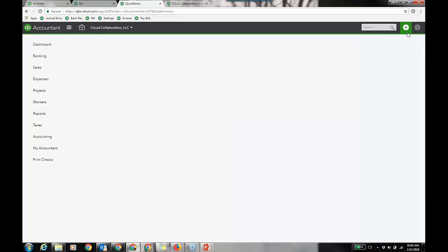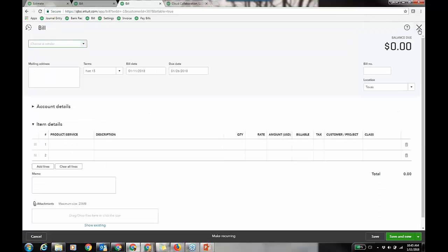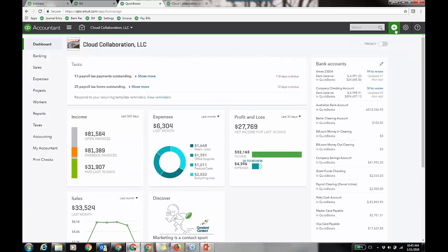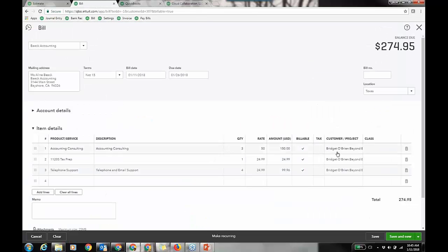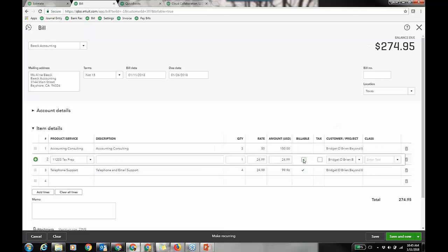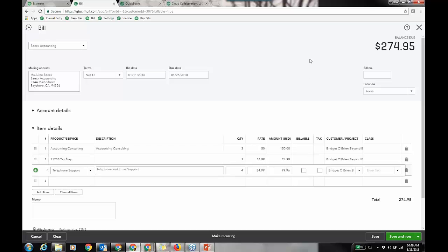And let's say you were doing a credit card expense or a time entry. Check, credit card expense, bill, I know they're different, but they're going to behave the same way with a project auto-filling on the bill. And what this allows me to do is show it on a P&L and put it on the budget to actual report. It does not need to be billable. Let's make that clear. Billable is only if you're passing it through to an invoice.